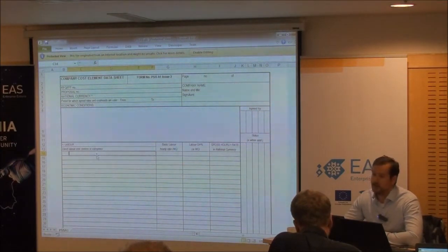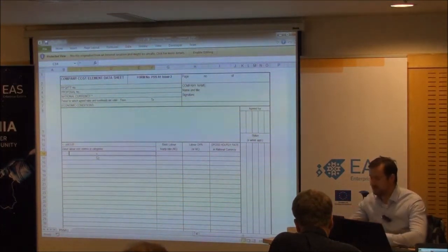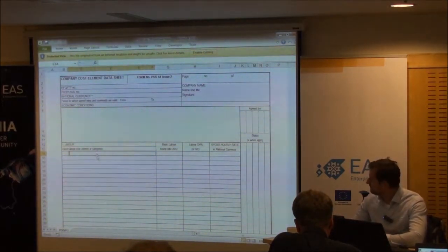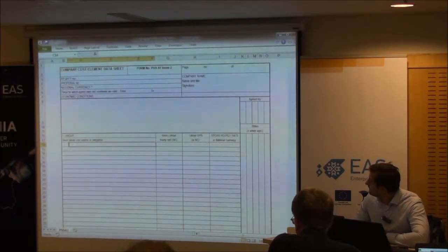Those are base rates, direct cost. We've got an overhead of 40%. So we'll just go and create those categories in here. You have to enable it. Yeah, just click on the top.